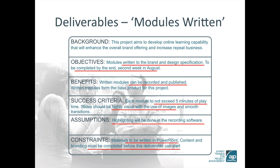I can see that the modules must be written in PowerPoint, not exceed five minutes, they should be highly visual, written to the brand and design specifications by the end of the second week in August. An important fact to consider here is the input from the subject matter expert who will be responsible for producing it. The PM must describe the objectives, success criteria and constraints, but should encourage input on assumptions and, crucially, the way in which the deliverable will be completed.